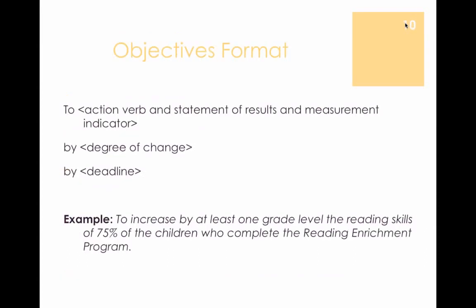If you're not comfortable writing an objective, well, let me give you some basic components that need to be in every objective. There always needs to be a description of the activity or service that you're going to do, the result of this activity or service, some type of tool in terms of how you will measure this, the standard of success, and the number who will benefit from this.